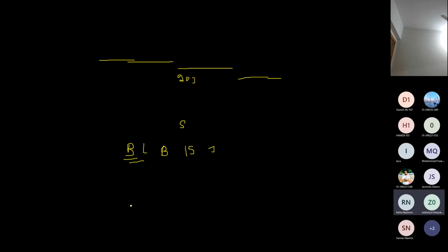So now let's say if you see the same example, actually it is erased because I switched the screen. So let's say now, because of the delay, the second activity will now start on 20th of January, right? Now if you see, according to the baseline, the start date of activity B was 15th of January. But according to the project schedule, its start date is 20th of January, right?